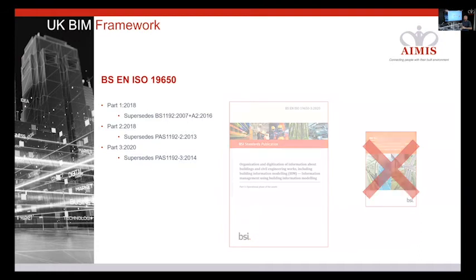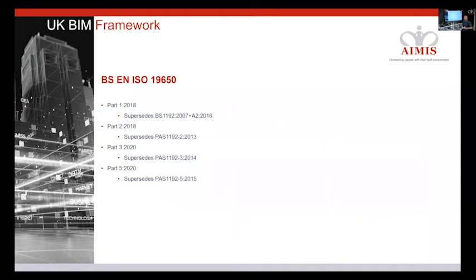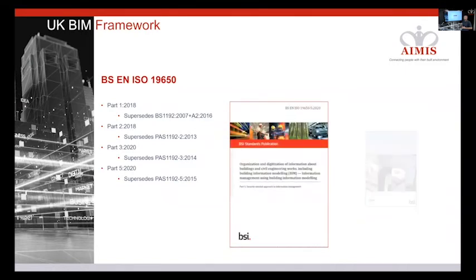And then the last one of the most recently released ISO 19650 standards is Part 5. And again, it supersedes PAS 1192 Part 5. So this is the standard which describes a security-minded approach to information management. And again, the PAS document is superseded.